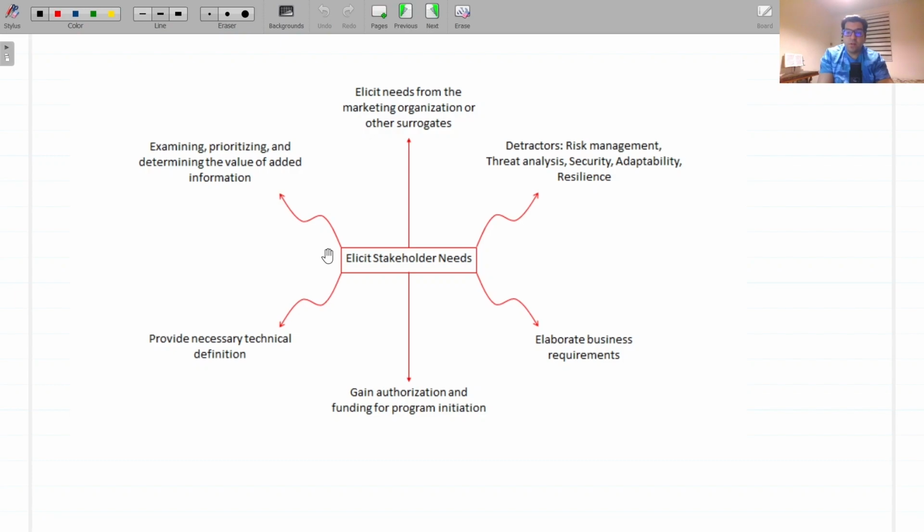Contributing users rely on well-defined completion criteria to indicate the successful definition of user and stakeholder needs. User organizations have gained authorization for new system acquisition. Program development organizations have prepared a SOW, STRS, and gained approval for new system acquisition. If they are going to use support from outside the company, they have issued an RFP and selected a contractor.